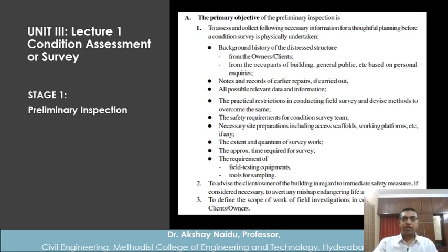First, background history of the distressed structure from the owners and clients, from the occupants of the building and general public. What was the distress there, and since when they are experiencing that the structure is distressed and not functioning properly. Next, notes and records of earlier repairs if carried out. All possible relevant data and information. Then practical restrictions in conducting field survey and device methods to overcome the same.